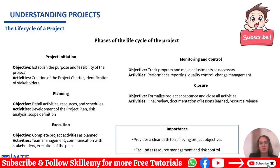So, in the closure, finally we reach the closure phase, where the project formally comes to an end. The objective of this phase is to finalize the project and ensure all activities are completed. Activities in this phase include conducting a final review to assess the project's success, documenting lessons learned to help improve future projects, and releasing resources, such as personnel and equipment, so they can be used on other projects. Closure ensures that everything is wrapped up properly and that the project deliverables are formally accepted by the stakeholders.